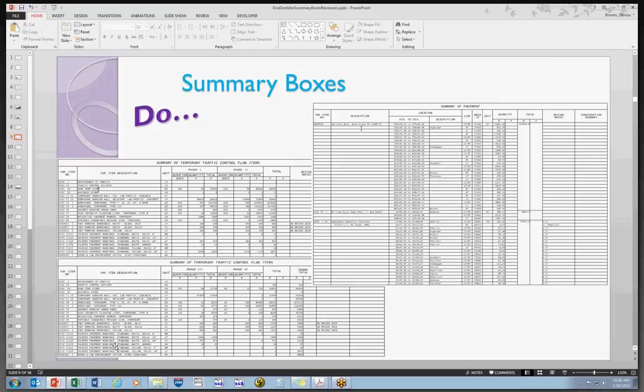And if that's the case, if you'll notice, I do have the paint in here, and I think what's tripping everybody up is this duration column. If there isn't a duration, because it's not an each day type item, then it needs to just be left blank. As you can see, these were the paint. In this particular case, they were put in by phases. They actually broke it out.